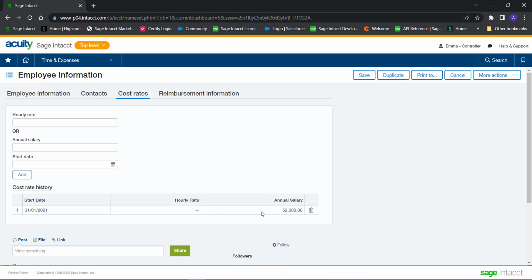That is just my simple way of doing this, just to talk about numbers. But in the background, I set up in the system what my weekly number of hours is. So in my system it's 40. So if I worked 40 hours in any one week, £1,000 worth of cost would be attributed to the project or projects that are worked on within that time period. Okay. So I just wanted to say that first, because that will make a little bit more sense once we start looking at the costs and things against the project.